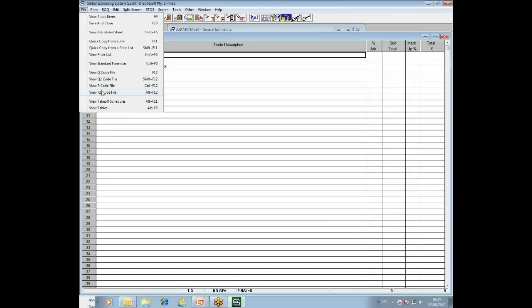Well, in essence, really, there isn't much difference. They do pretty much the same thing. However, the OR code is a maximum of a 3-character code, and the OR2 code is a maximum of 6 characters. So the uses for those really would be where the OR code may be used to resource a job